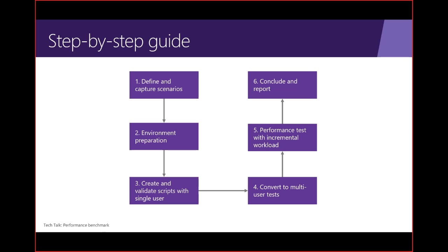You also need to talk with your customer and understand, when you run the performance testing, how much history data, how much peak transaction volume you need to test against, and also where you can get those configuration data, who is going to load the master data for the testing, those things. So you need to work with your customer and the project team, and finalize.